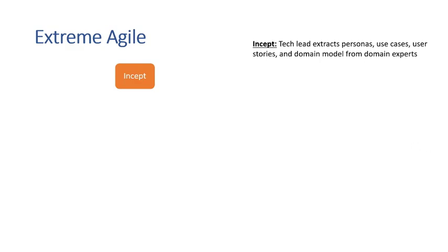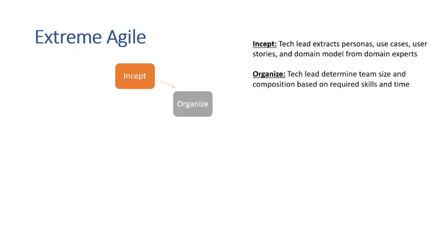Then you go to the organization phase. So we have this inception phase, then we go into the organization phase, where the tech lead, and it should be a tech lead, not the architect, but an actual tech lead, determines the team size and composition based upon the required skills and time, right? So we can organize our teams now.